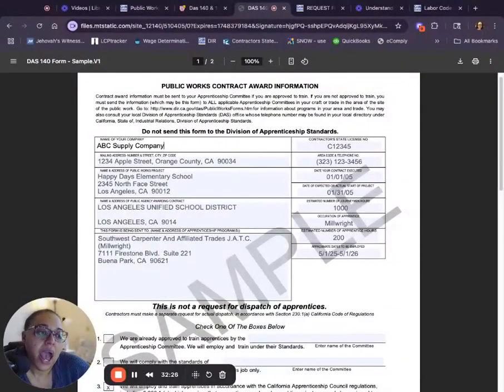Are the journeyman hours known? Are they accurate? Have you asked for them? Do you calculate the correct number of apprentice hours? So remember that 200, it's a big number, but it's just 20%. It's always going to be 20%. It's not always going to be 200, but it will always be 20% of the journeyman hours.